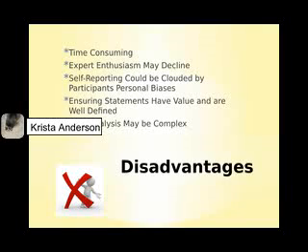While Delphi technique has several advantages, some aspects of the tool may be a hindrance to a project. The tool is very time-consuming to employ. From the creation of the questionnaire to the multiple feedback collection rounds, Delphi technique takes time to complete. Because the process is long, the expert's enthusiasm and willingness to respond to the questionnaire may decline over time.